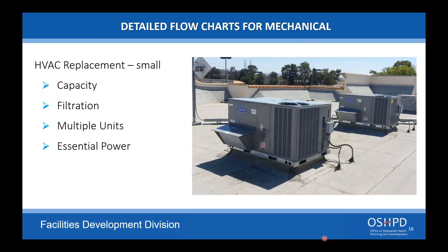Since we're on this slide here, we have just released an expedited building permit that is all online for skilled nursing facilities where you're replacing a unit similar to this. And it really helps the process. It can be done all online, and for the application, you just fill out a series of questions that you comply with capacity, filtration, grounding, etc., and you can use that. And that's on our website as well.